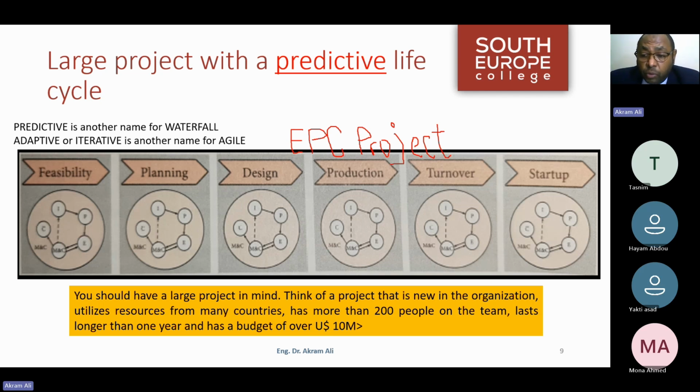Is everything available? What's going to happen after 2 weeks, after 4 weeks, after 2 months, or 6 months, depending. Maybe if I am in a place where there are no challenges related to logistics, I only need to look ahead for 2 weeks or 4 weeks. But depending on my understanding of the nature of my project, the nature of resources and inputs into the project, and like I said here, we start procurement somewhere in the design.